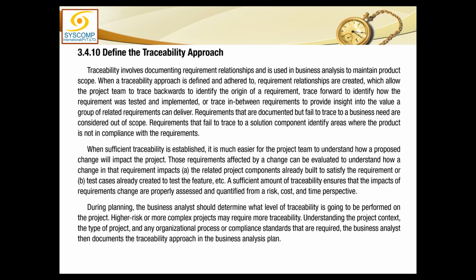Requirements that fail to trace to a solution component identify areas where the product is not in compliance with the requirement. If the solution produced is not according to the requirement, then it should not be cleared. It is not in compliance. So this thread of requirements is called the traceability.